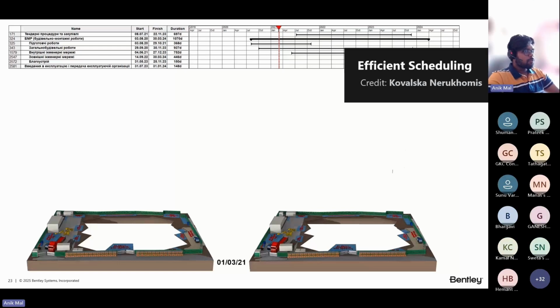When all existing project models had been combined with the schedule, resulting in a very detailed 4D model, simulating different construction scenarios helped them to save 2 months in the total project duration of 2 years, which is a 9% reduction in the total time.